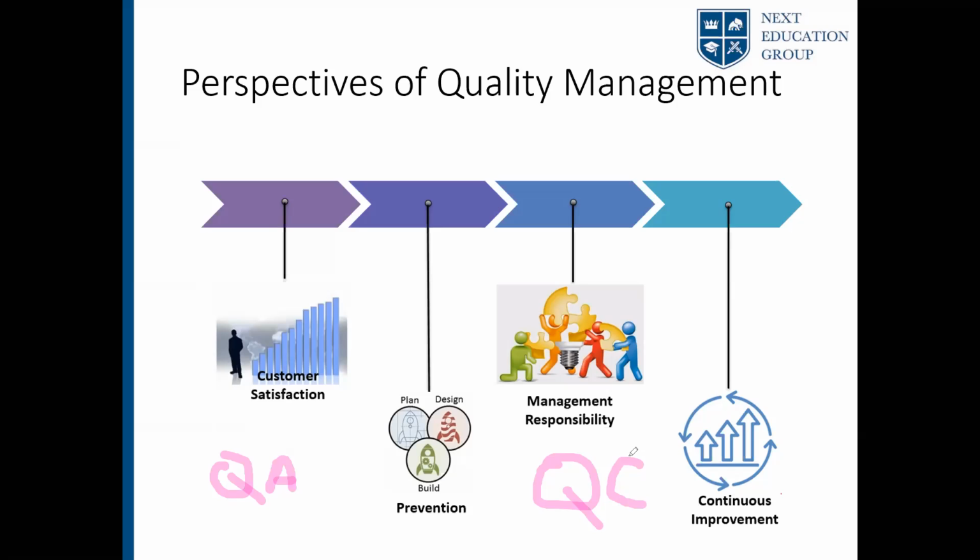Dimitri, any idea what quality control is? Quality assurance is if you are delivering a product. Okay, quality control is after you make a product, checking that the quality has met the standards. It's like a reactive measure. Quality assurance is like a preventive measure. You set a standard, that is quality assurance. Quality control is checking that you meet that standard. So assurance is preventive, control is reactive. Exactly. So that was the answer I was looking at, right?